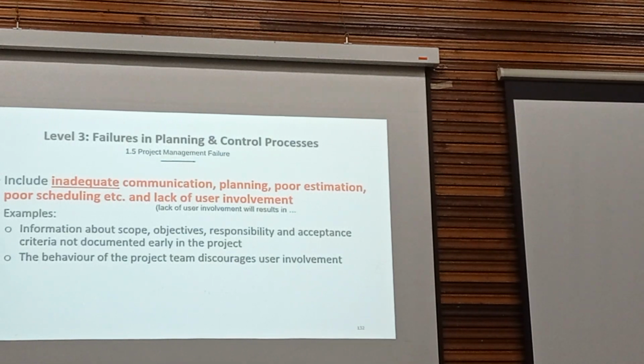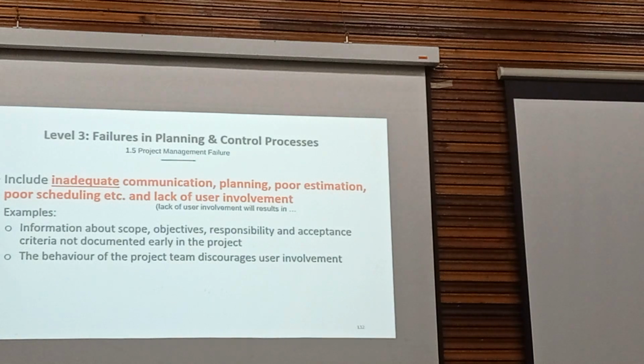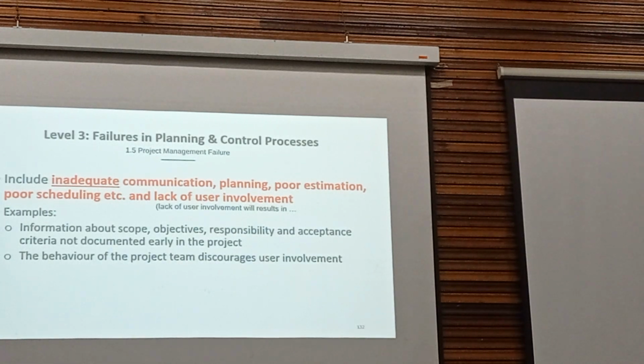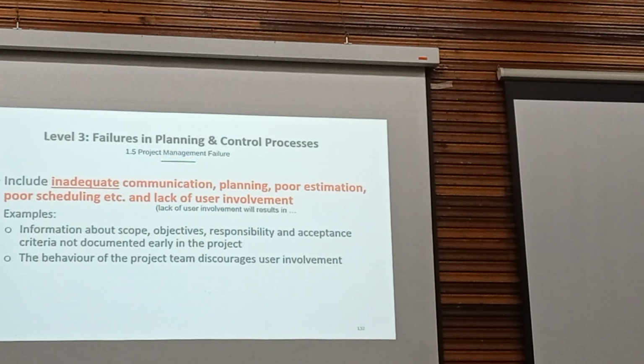And this will result in the complete system not meeting user expectations. So when this happens, later on there will be a lot of change requests coming in. I've seen this kind of problem.